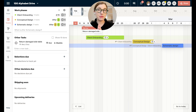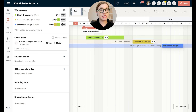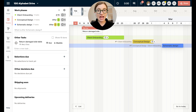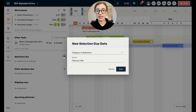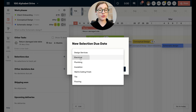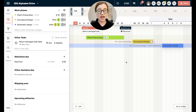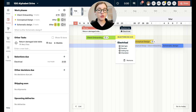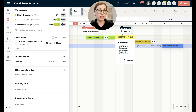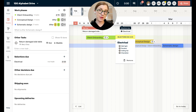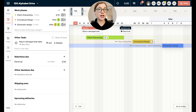There are a few other ways the timeline can be handy when running a project. On the left side you'll see selections due, other decisions due, shipping soon, and upcoming deliveries. You can add a selection that is due — select any category from your scope of work, like all electrical items to be decided by February 23rd, save that, and it will show up as electrical selections due. As selections are decided you'll see check marks go there, and if you send the progress report with the timeline your client will also see these upcoming selections.